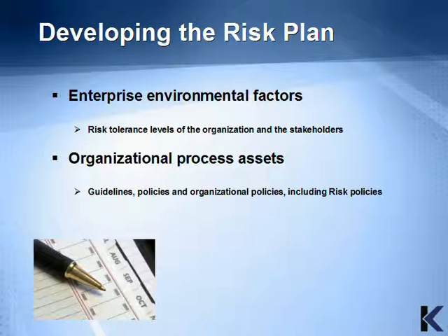The key element of the enterprise environmental factors is the risk tolerance levels of the organization and the stakeholders. As I mentioned earlier, knowing the stakeholders' risk tolerance levels will guide the project manager in the risk response planning. That approach would be documented in the risk management plan.